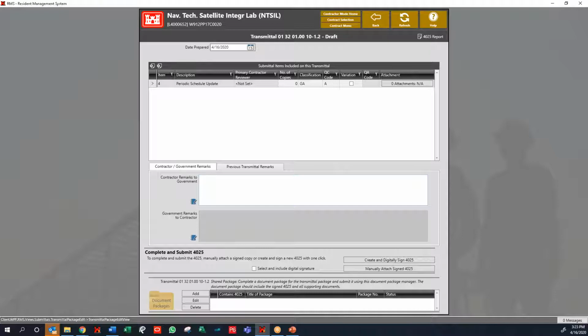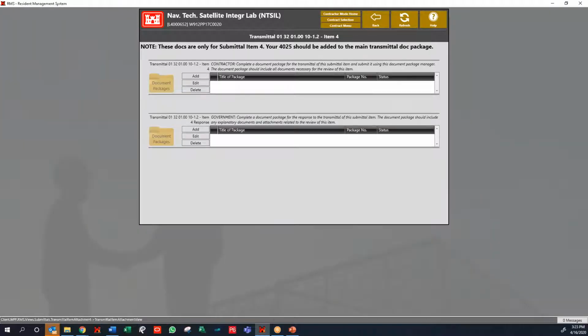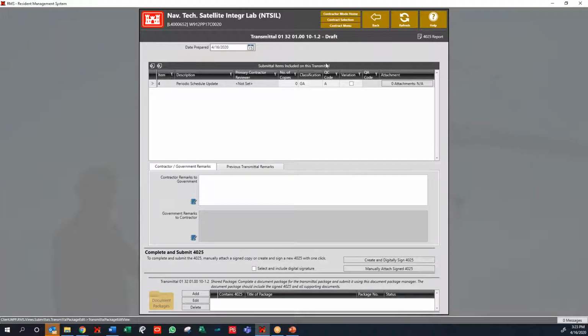But those are the things. I typically provide a critical path report, milestone report. I typically provide scheduled views, Gantt chart views of those as well. So we usually have about 11, 12 items put in here, the SDEF and the XER. So the nice thing is we can attach all those things.